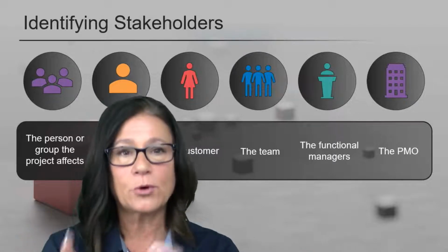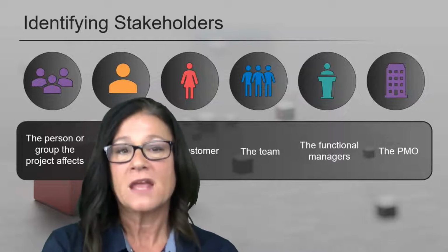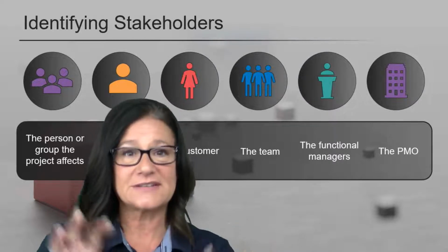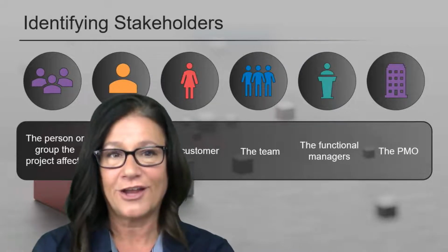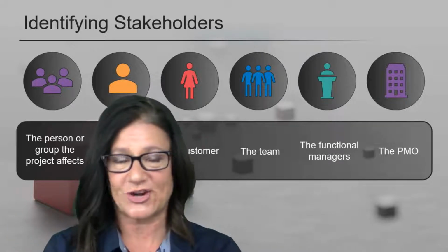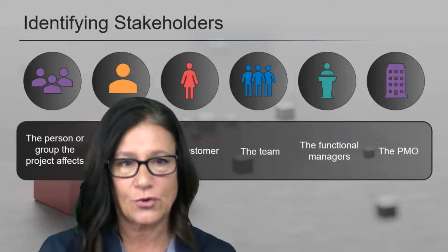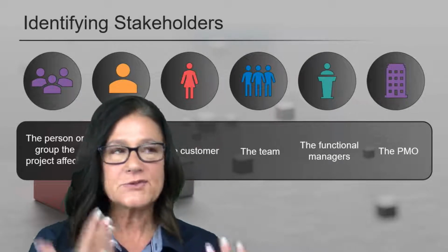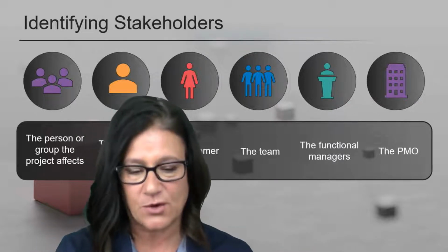They approve formal change requests in a predictive environment. So the assumption is in that predictive, traditional waterfall side, we have a baseline, and if any changes are necessary, they have to be processed through a change control board. Now, there's one that I left off, and this is the other reason I wanted to talk about stakeholders.